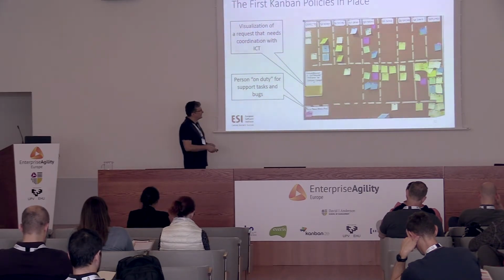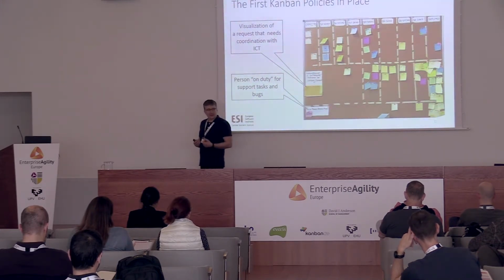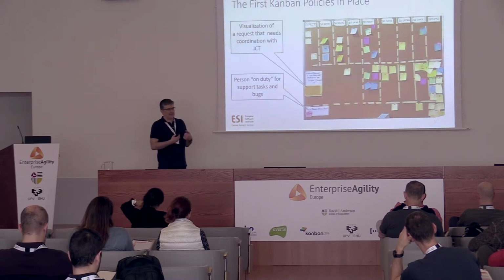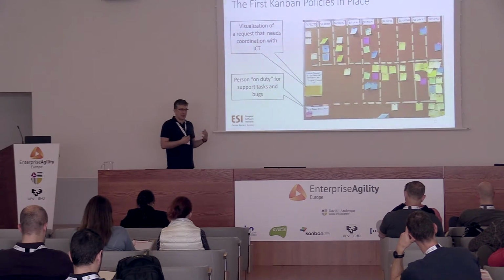So at that time it was ACHO, and it does not mean that ACHO will resolve all the bugs. ACHO will accept the bugs, will decide how urgent they are, will organize them, and if needed, ACHO can ask the team, please help me, I have more bugs than I can serve.